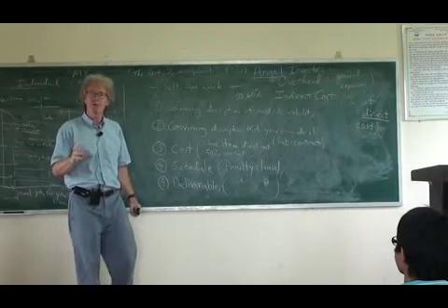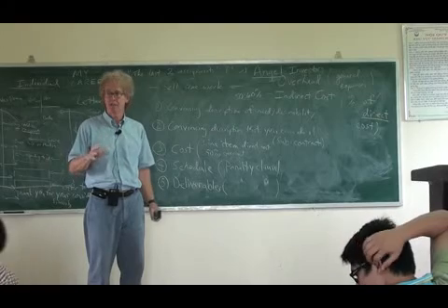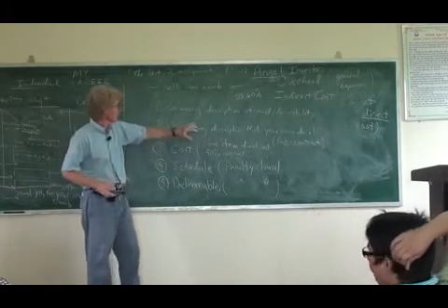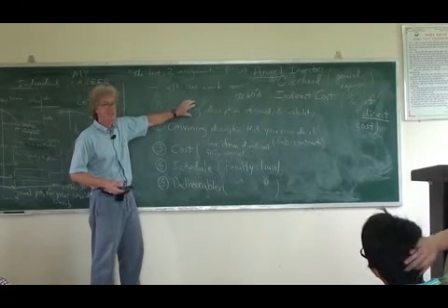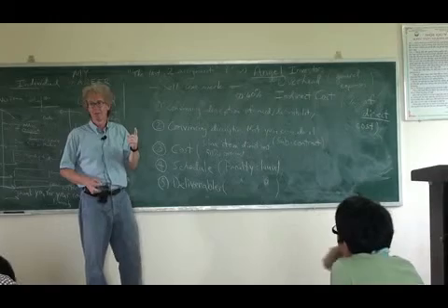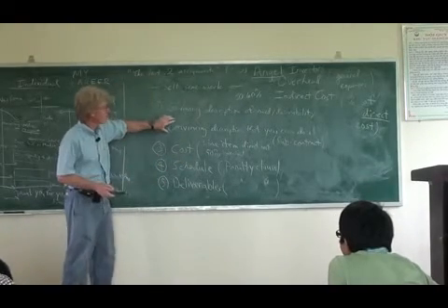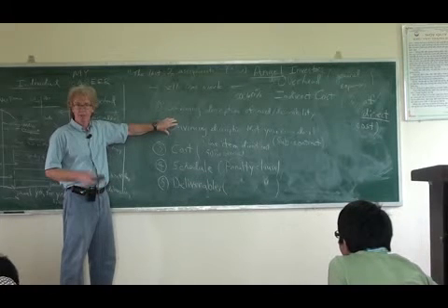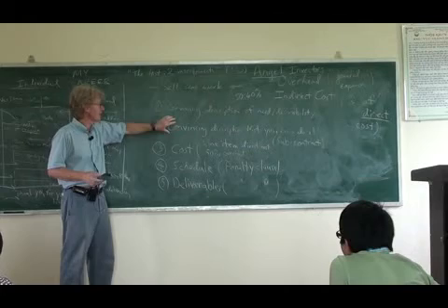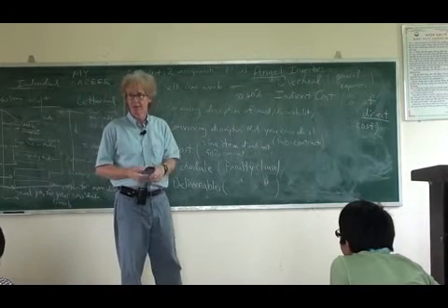The proposal that you give me should probably have somewhere between 5 and 10 pages. Okay? Writing this section, for instance, convincing description of the need and desirability, this should probably be at least 1 page. Okay? Then, this part, a convincing description that you can do it, this also will be at least as long as the first one. When I say convincing description, I mean you really have to have the details. You have to show that you know what it will take.